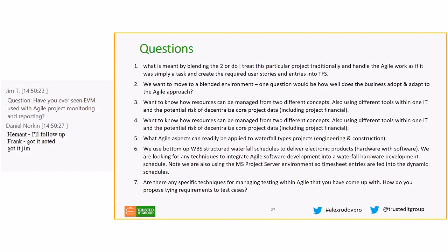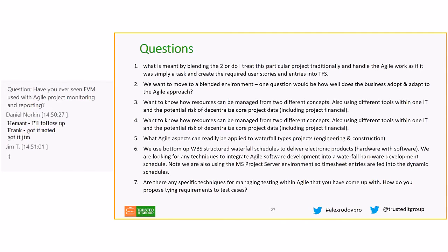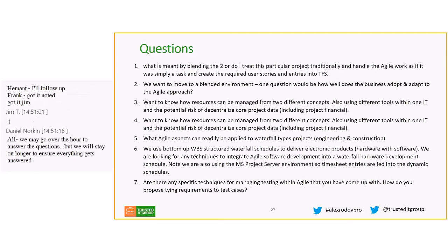You may have a section where development or testing is going on, and you can create those sprints in this section of the plan and keep them there. There are a number of integrations, so you don't have to put anything in manually. You can have an integration grab those items from the Agile system and put them in the right sections of your project schedule timeline. That's very much doable, and I've seen people doing that.